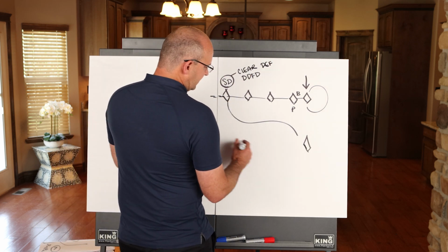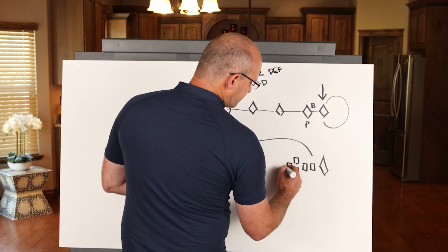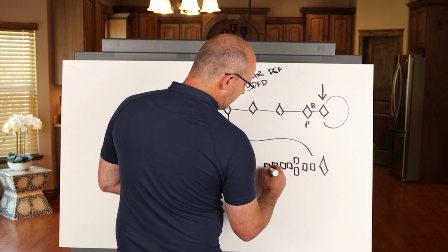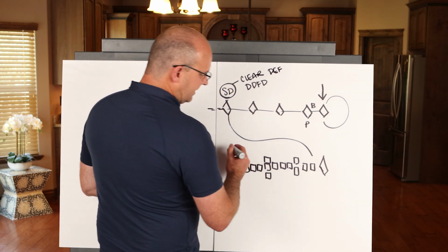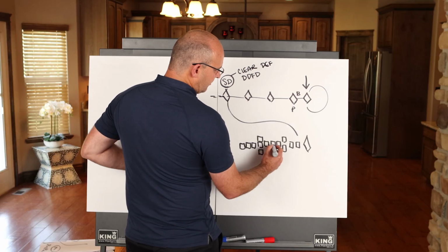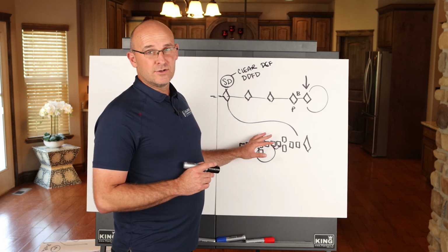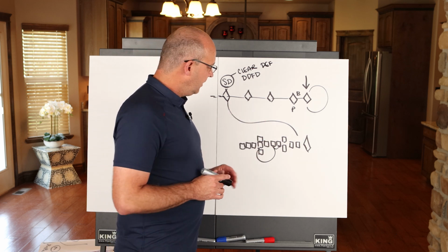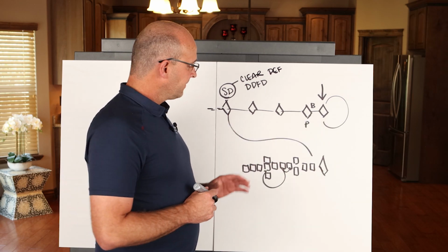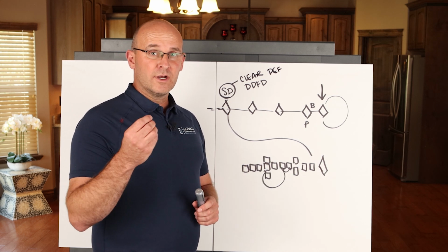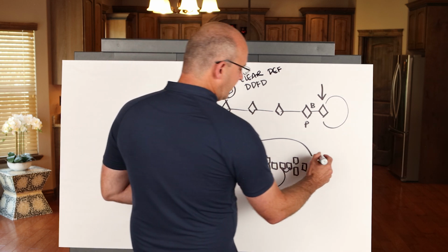Now, what's cool about this is you can either do a pull plan, which is what I've seen mostly, okay? A pull plan of this entire phase. By the way, I love doing this. It's really cool to hear designers talk about, well, for me to do this, I need this, and this activity releases this one, but really it comes back to here. And looking at all of the nuances there is pretty fun. I would highly recommend doing this on Miro or some other virtual whiteboard, having all of the stickies per discipline pre-filled out on the actual whiteboard, and then putting it together in a manner where the project team can really be successful.